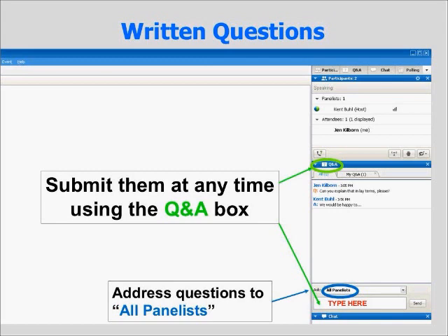And also on that site, you will be able to email the tribal officer, be it the chief or the president or a staff person at the tribe, and tell them your project and ask them if they are interested in commenting on the project. If they say yes, then you should give them the information they need in order to comment on it, just like you would with a SHPO.